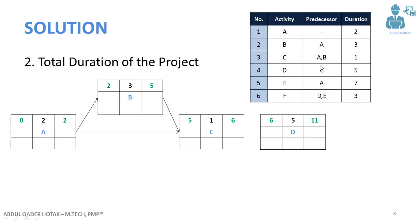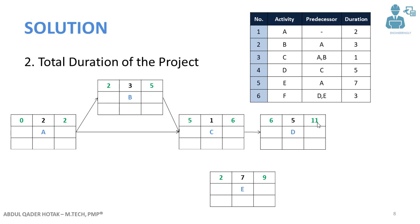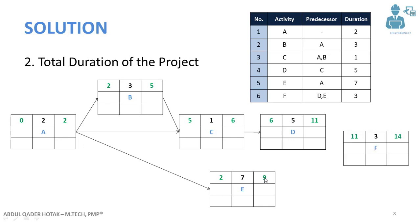Activity D has its predecessor as activity C. The duration of activity D is 5 days. The earliest we can start is day 6, which added to its duration gives an early finish of day 11. For activity E, whose predecessor is only activity A: activity A ends on day 2, so activity E can start on day 2, and its early finish will be day 9.